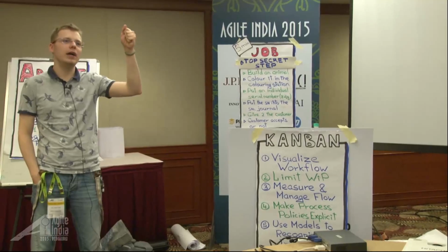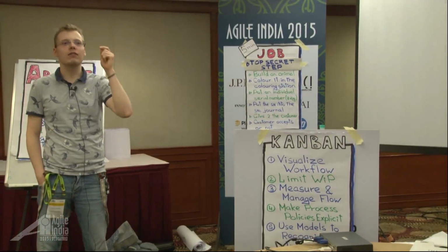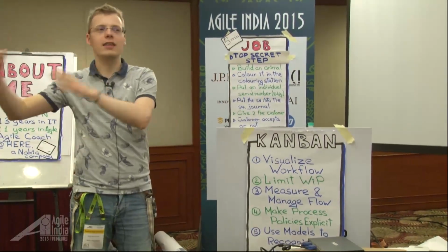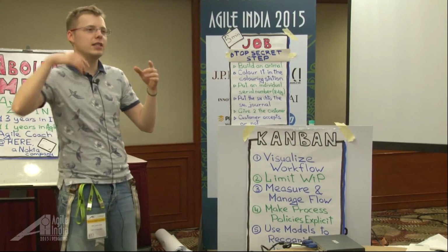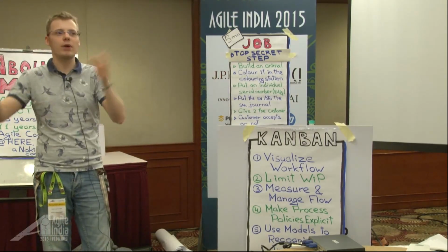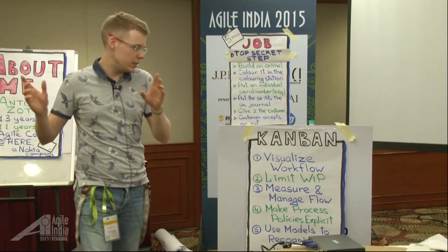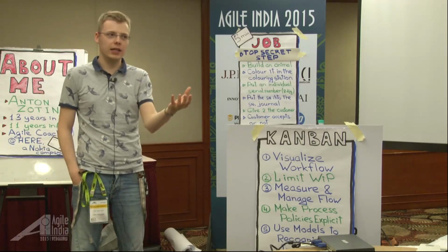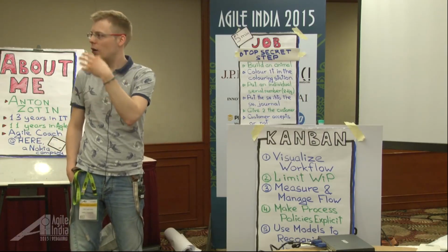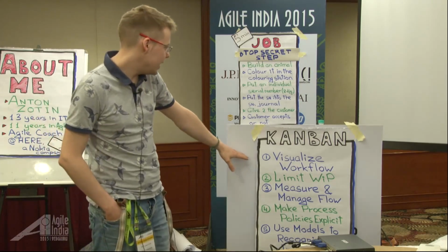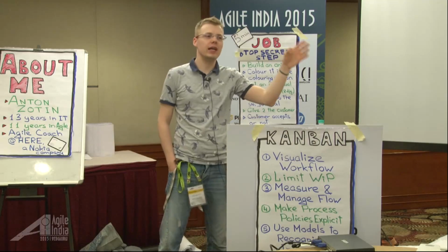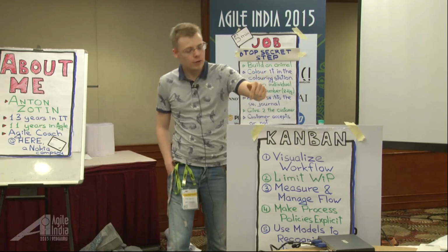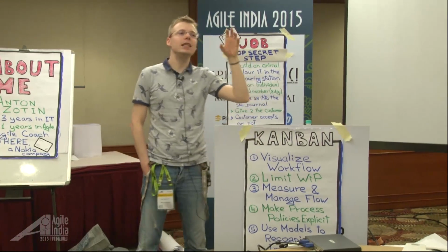If you got a book by David Anderson, the essence of Kanban method, it's just 5 steps. And that's all. All other parts of this book, that's just philosophy, some ideas, some examples, some experiments. The core idea of Kanban is simple. First, visualize your workflow. So how it goes, really. So everyone will be able to see how it works. Second, limit work in progress. So define the steps that you visualized in the first version, and limit work in progress.